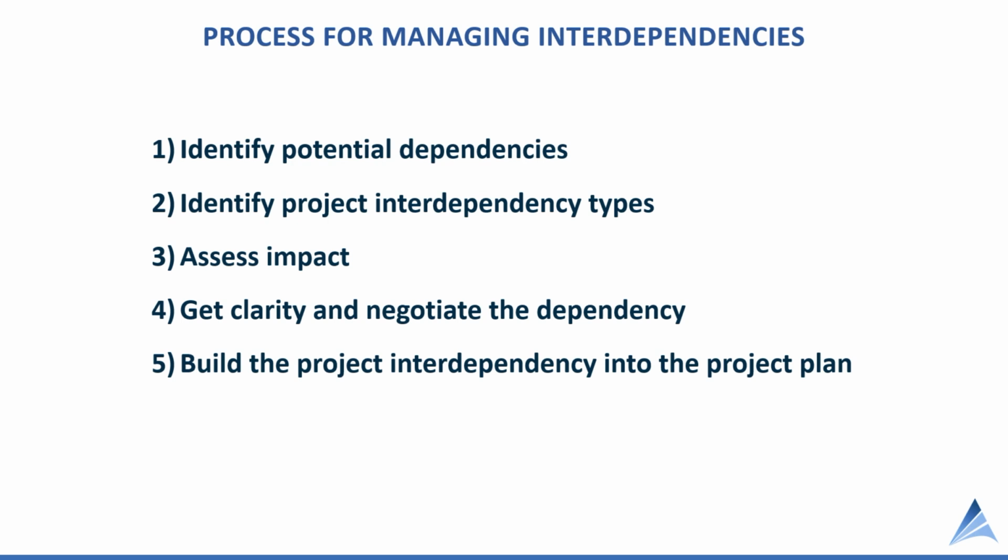This can be facilitated in different ways, but it's very valuable to bring the project managers together, help provide the high-level scope of all the projects going on, and allow the project managers as a group to identify the potential dependencies. This approach works well when you're introducing interdependency management in the portfolio.